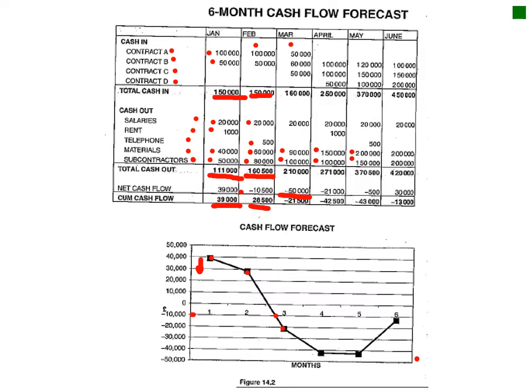From here on, you need to have credit to actually finance your project. Okay, same again here, and you can see it's actually picking up here in June, and July might be a better month where you actually start going through the break-even point again, where you're actually getting a positive cash flow. Okay, very simple exercise that you guys can use.